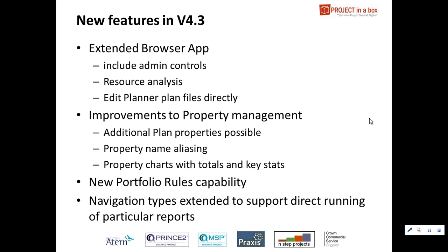Now, in the past we could do things like totals, but we could only total things that were numeric values. So if you had the budget cost of 10 projects, you could have the total at the bottom of that. If you had something like a status or the name of the project manager, that wasn't totalable because it was text, but we now offer a count type total.